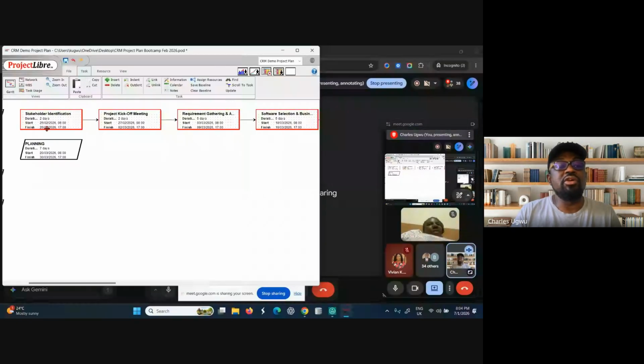If this one was supposed to finish by 26, and is now finishing on 27, it is now pushing our project's timeline. Meanwhile, sliding into scope creep.